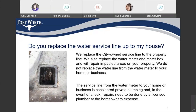Do you replace the water service line up to my house? We replace the city-owned service line to the property line. We also replace the water meter and meter box, and we will repair impacted areas on your property. We do not replace the water line from the water meter to your home or business. The service line from the water meter to your home or business is considered private plumbing, and in the event of a leak, repairs need to be done by a licensed plumber at the homeowner's expense.